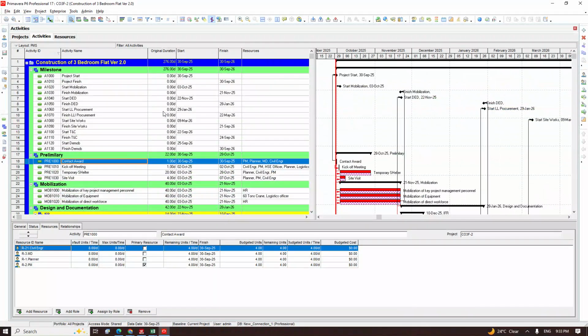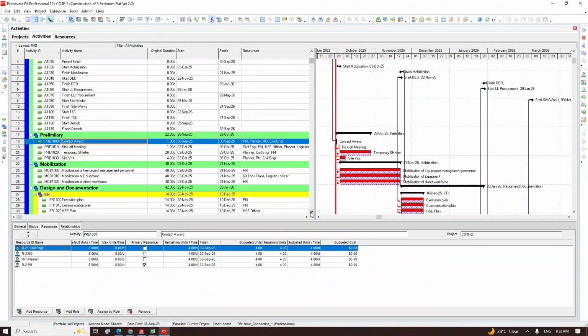Let's assume this project involves electrical, mechanical, and civil. So I can decide to create activity codes for mechanical, electrical, and civil. So any activity that is electrical, I will assign electrical. And any that is mechanical, I will assign mechanical. Any that is civil related, I will assign civil. So you have created this. If you want to know the civil tasks, I will just quickly click filter by civil activity. I will see all the civil activities. But a simple example I'm going to use here is to assign it based on WBS.